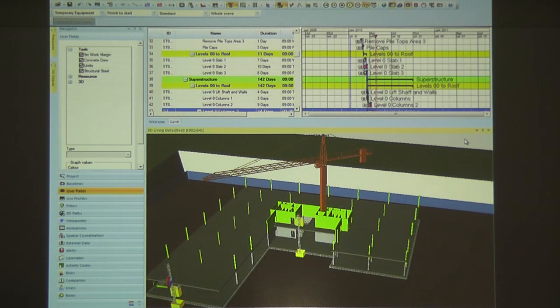So at any point in time, the general contractor, who is most likely using the software, it really points out, well, wait a minute, I can't work in this area yet. Why? Well, because I have a crane there. I can't move the crane to have the electrical guy dig the trench. You know, it's that type of site logistics that happen.